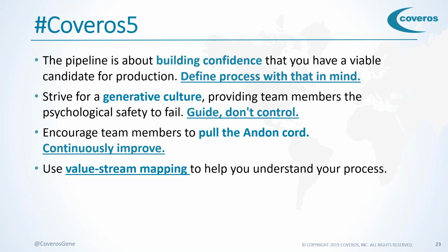One of the examples I give in FDO is when I was doing a private FDO, and I had about 20 people in the class. So we split it up into 2 teams to do value stream mapping. And even though they all worked on the same product, they came up with radically different value streams because they had different people in their groups figuring out what they were. So they actually took the time to get together and combined them into one value stream and started realizing that, even in groups of 10, they only understood half to two-thirds of what the process looked like.